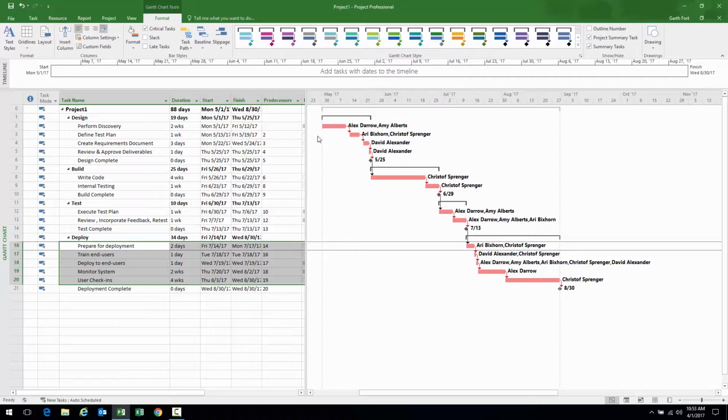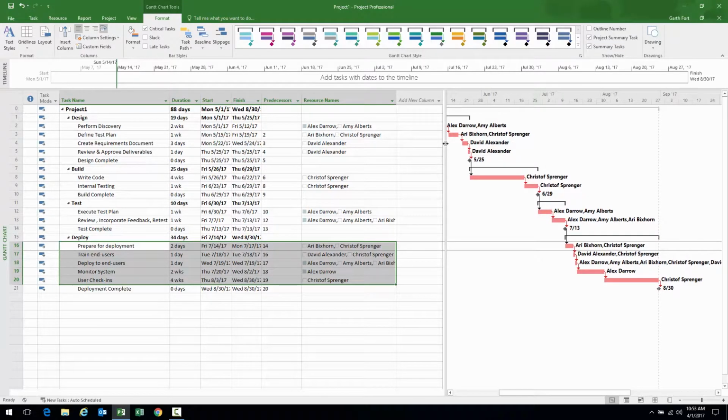What you might want to consider if you're not currently using them is baselining your project. Baselining is something that will be good to get used to using. It's a great way to have kind of a target to shoot for. It's basically like, this is what we said the project was going to complete on: the scope of the project, the hours of the project, the cost of the project, finish and start dates of the project, and this can be the target that you're shooting for. You can also use it to help you incorporate lessons learned. If you constantly are missing dates, constantly coming in over budget, over hours, you'll just know that maybe we should consider revising the estimates in this template or something like that.